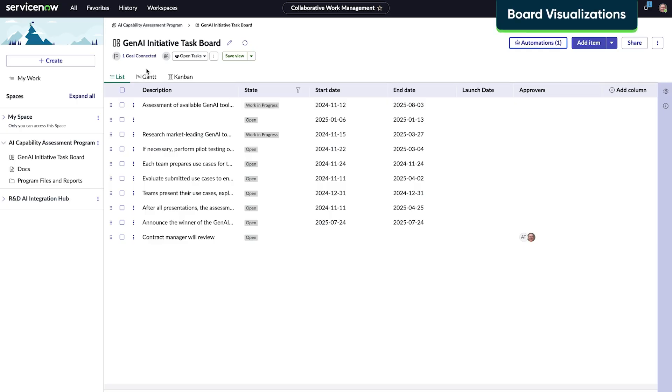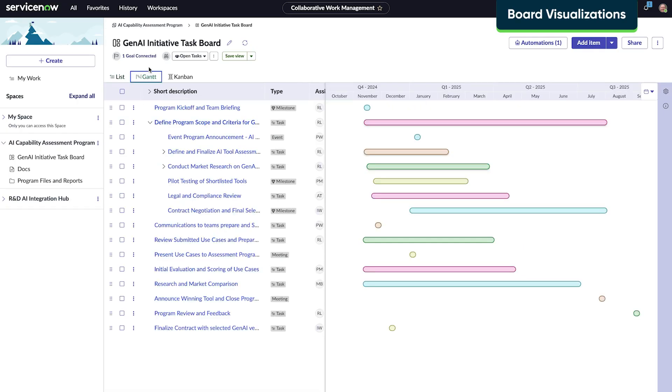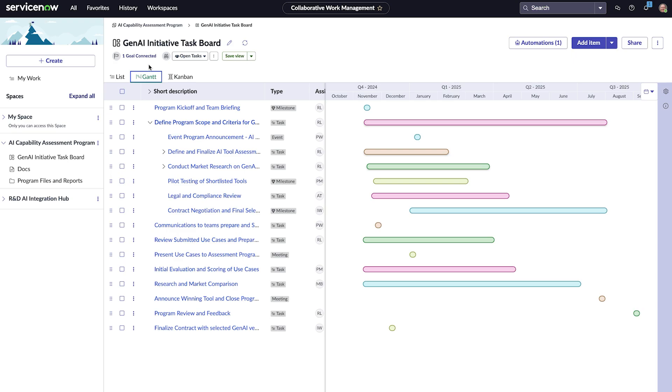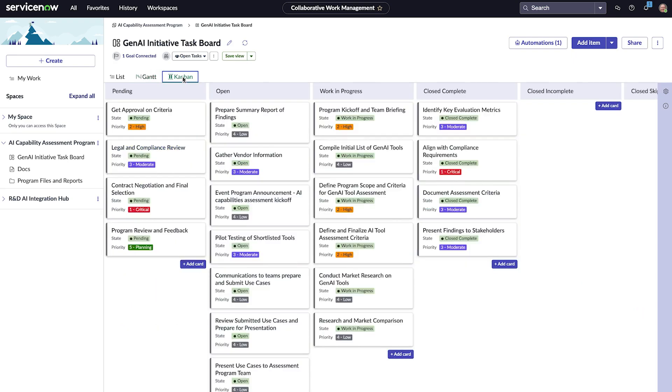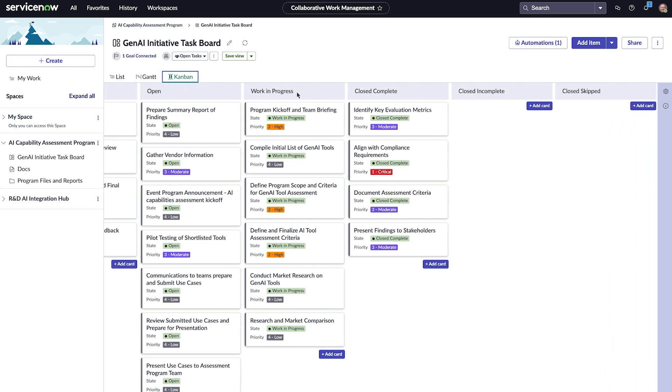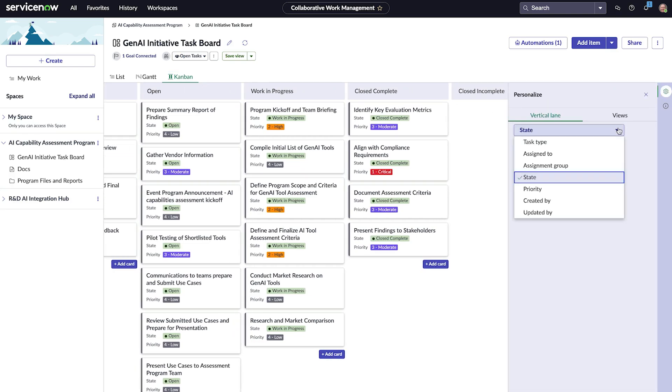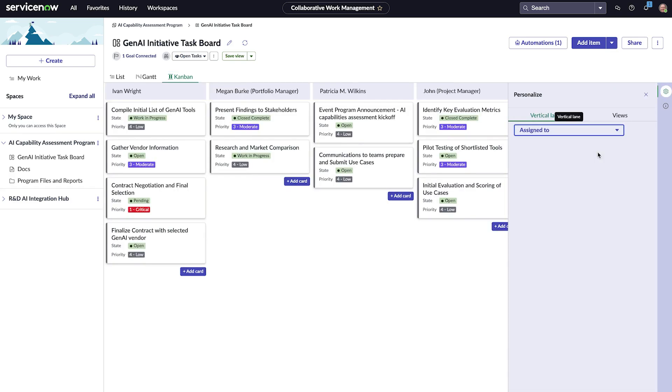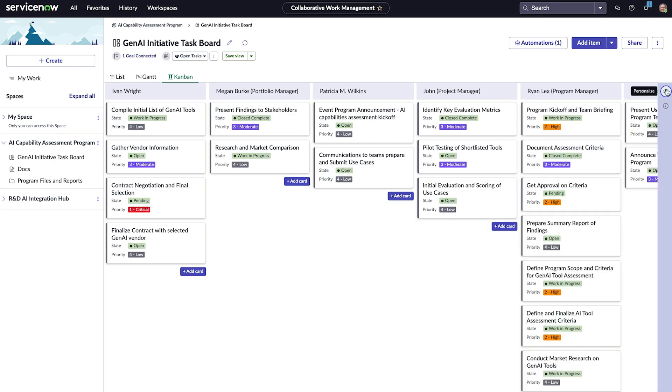Ryan can also view the task board on a Gantt or Kanban view. Gantt gives him a comprehensive view of timelines associated with each task. And Kanban, which gives him a one-dimensional categorization of tasks based on the selected attribute, for example, state of each task or assigned to.